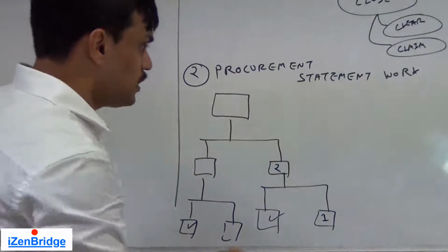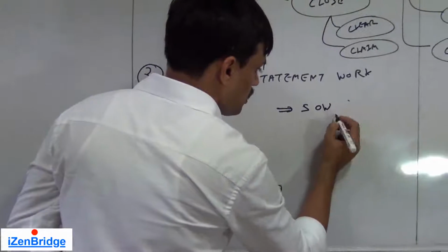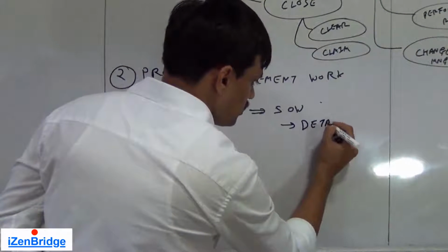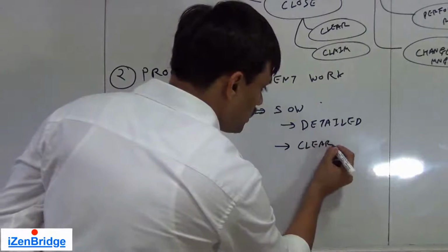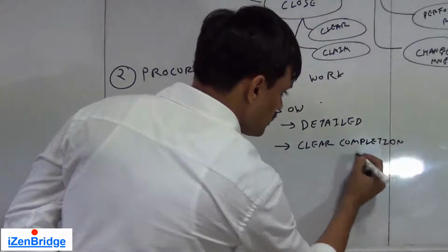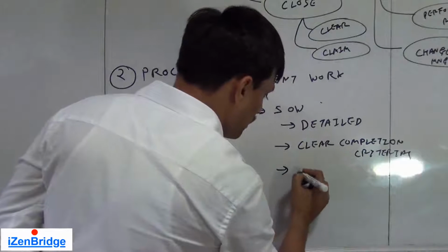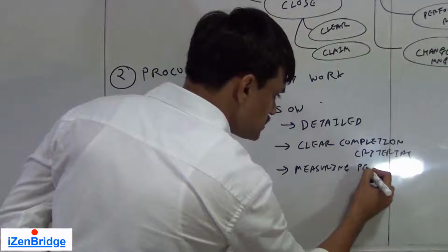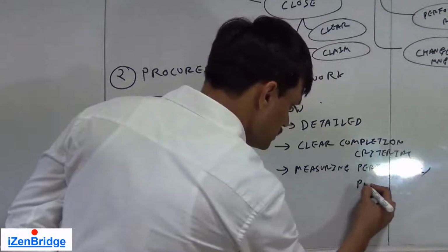On the basis of this you create a statement of work, and this statement of work should be as detailed as possible, should have clear completion criteria, should give enough detail about measuring performance as well as progress.